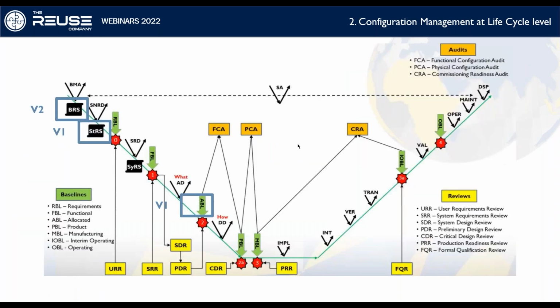If we look at another example, let's say a 2D view of the V model, we transit from process to process to build the system, to develop the system, and you see that in each of the processes we produce documentation, specifications, and some of the main productions are being baselined. So we keep a version of these elements. Configuration management is basically the process of applying this baselining at key stages of the life cycle. When we do that, we keep track of the configuration of the product, and therefore we're capable of controlling the change that might occur in this document.